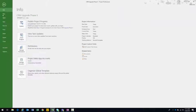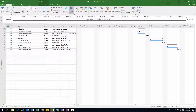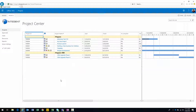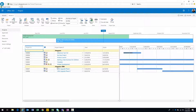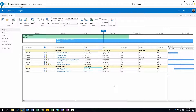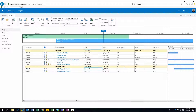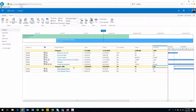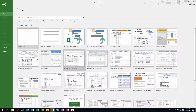I'm going to check this out, publish it, check it back in, and let's go back to Project Center. I'm going to click on projects. This is the all-important view to me. Here's CRM upgrade phase one and two. Notice that the Gantt chart does reflect reality — you can see the overall duration of phase one versus phase two, and dates reflect reality now as well. The other thing that can be powerful is if I click the rollups button, I'm able to see the aggregates for the project program. We don't have the master project in Project Pro, but I can see the aggregates here for any numerical currencies — the overall duration, and if there was cost information, I'd see the aggregates for that too.